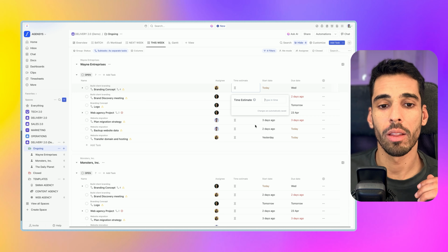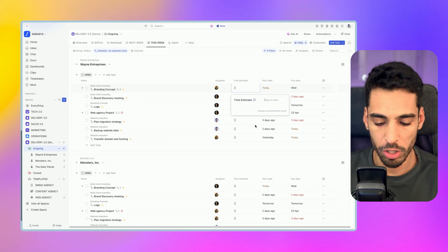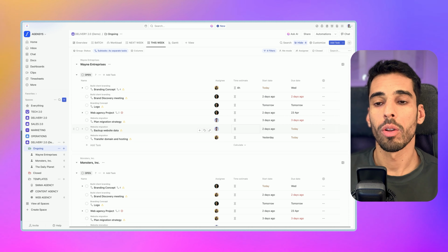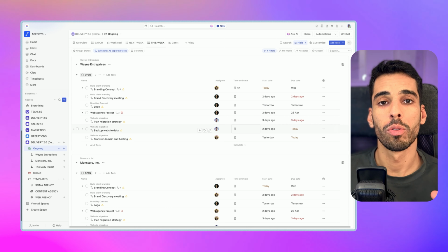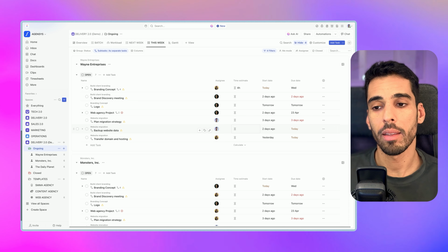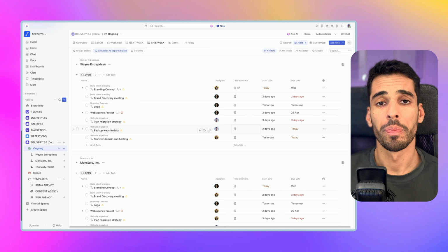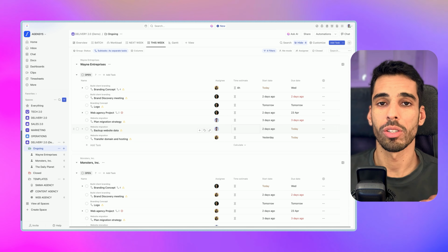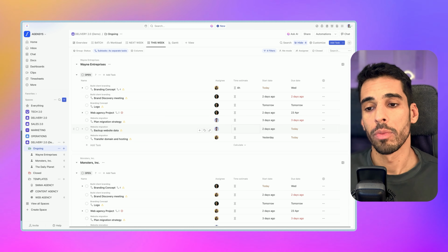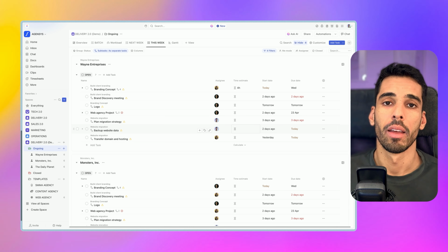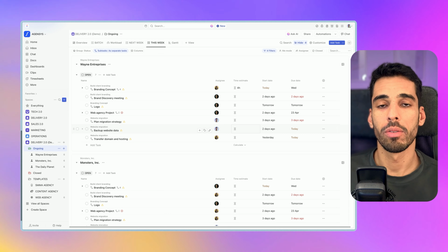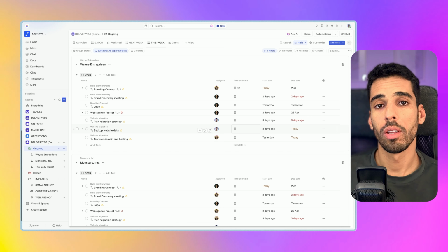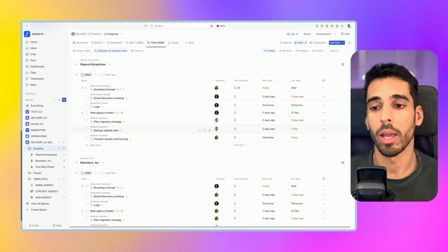That way, if you know that the branding concept on average takes 4 hours, you don't have to do it all the time. You can do it once, save it in a template, and that's it. It will be done. Now, the agency's templates will contain time estimates that are just rough market averages, and you can tweak them. But obviously, you can create your own templates and save them, and then from there, reuse the existing time estimates.